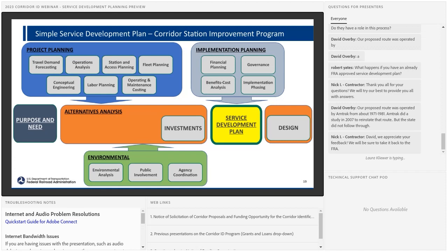And really, even investment options end up dropping out of the alternatives analysis. You know what the projects are. They are improvements to existing stations. So that drops out as well. Then in terms of the project planning work, several things drop out too. Look at the operations analysis: you're not going to be changing your timetable, so you're not really going to be looking at operations analysis.